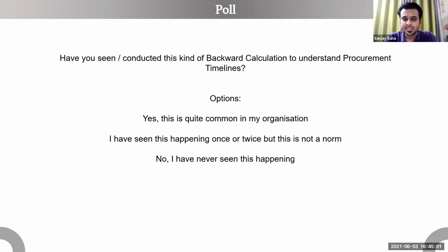So that's one of the key issues I've seen almost everywhere. And I tell you, one of the reasons why we face a lot of issues at clearance is that we don't take that time into account when we are counting the days. Number two, the import authorities, customs, have very set rules and very set documentation, and we never take those into account as well. And they also keep on changing, by the way.